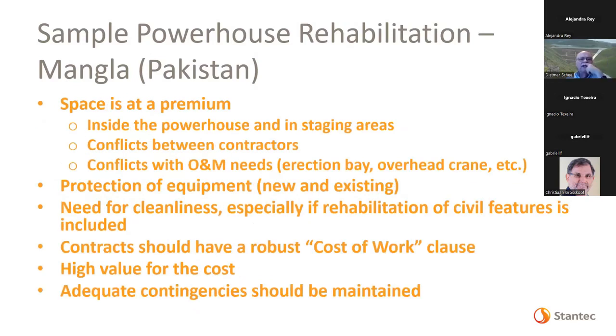Space, of course, is always at a premium inside the powerhouse and staging areas. Many power plants only have one erection bay. You're going to have contractors fighting over it. You also have your own O&M needs. Who's going to own the overhead crane, for example? Those things need to be thought through, and the rules of engagement need to be defined.